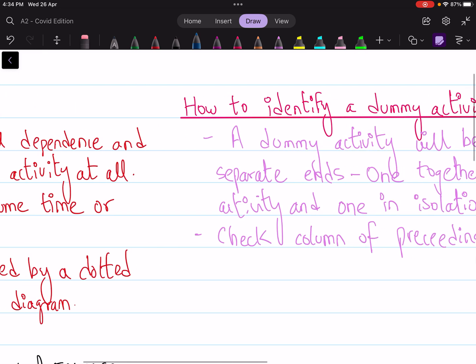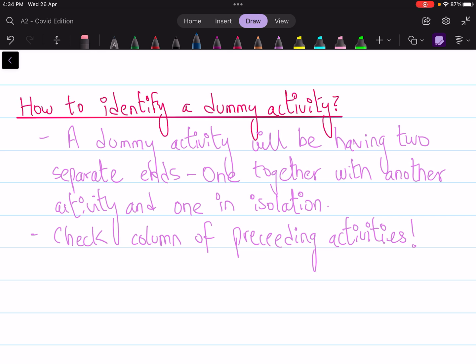When you are given a CPA question, it's very important to identify the dummy activity. To do so, you check the column of preceding activities. You'll see that there is an activity that needs to be completed alongside another activity, but in another row of the preceding activities column it ends in isolation as well. You can clearly see that activity C has two separate ends — it requires completion alongside D and also alone.